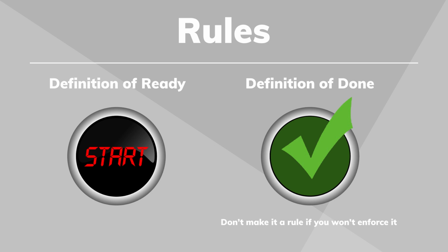Definition of done. For example, one of them might be that there are no outstanding high priority defects. Okay, great. That's pretty straightforward. Now, why would we want that in the definition of done? Well, this is because we want to be able to assess our work and how much work we have completed. So if one of our completion criteria here, or the definition of done, is that there's no outstanding high priority defects, then if there is one, we're not done.